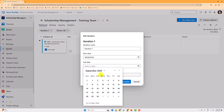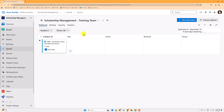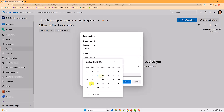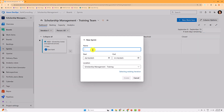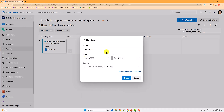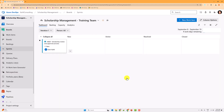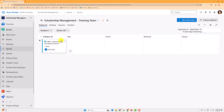Let's configure Iteration One starting from this Monday for a two-week sprint — Monday to next Friday — then save and close. I'll quickly do the same for the other iterations. We can also add another sprint: Iteration Four. As you can see, DevOps detected the pattern of your iterations and pre-filled the start and end dates automatically.